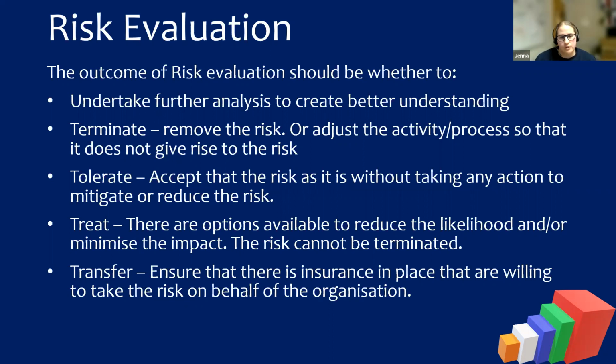There is the option to treat it. Treat is probably the most common term that we're going to refer to, and that's about putting in controls to reduce the likelihood or minimize the impacts to the consequence of that risk. There is also the term to transfer. That's about higher level things, where you might put insurance in place so that the company is willing to take the risk on behalf of the organization.